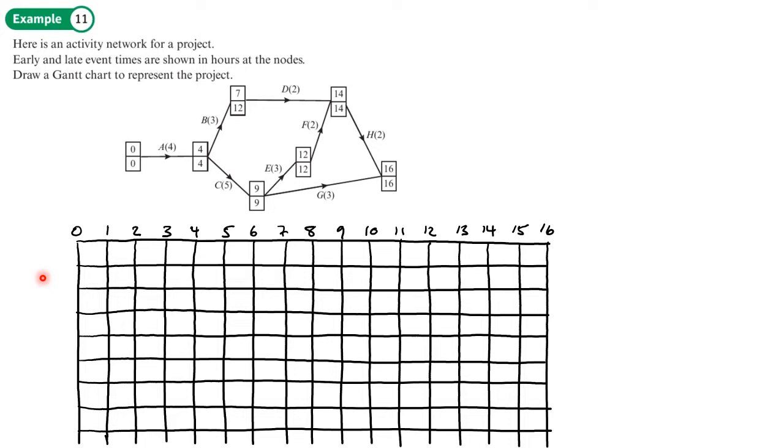First thing to do is to identify my critical activities, because I'm going to draw them in one block in this row here. So this will be my critical activities. We want to identify what the critical events are, and then we want to pick those that have a float of zero. My critical activities, or critical events, are the ones where we've got the same numbers in both boxes. So A is a critical activity, because the difference between those is four. So we'll just highlight that.